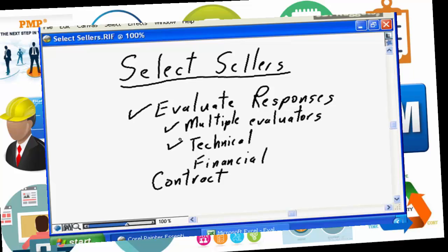Often the technical evaluation will be done first to ensure that the solution satisfies the technical requirements, that it truly addresses the project requirements first, and then secondly, addressing the financial requirement. Once you have determined which packages, which solutions will satisfy the overall project requirements, you will then pick the best package, the best solution based on the financial situation, i.e. the cost for the proposal.